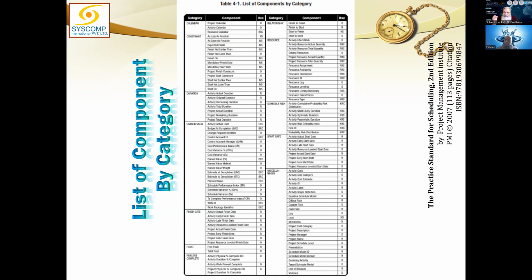If any single item, required item, is not achieved, your schedule fails. Any single required item you do not achieve, your schedule is failed just because of one item. Optional items, if you score all the required items, will give you extra marks. That will determine how good your schedule is.